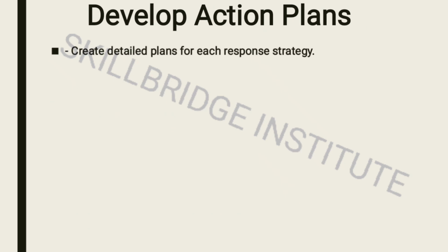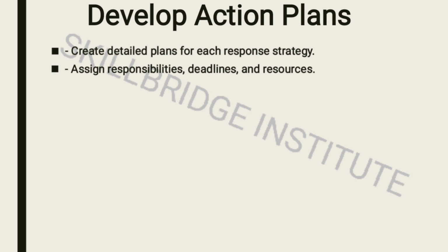Let's talk about developing action plans. On developing action plans, you need to create a detailed plan for each response strategy. Then from there, you should assign responsibilities to particular people. Then you should set deadlines. From there, you should set the amount of resources that will be required.